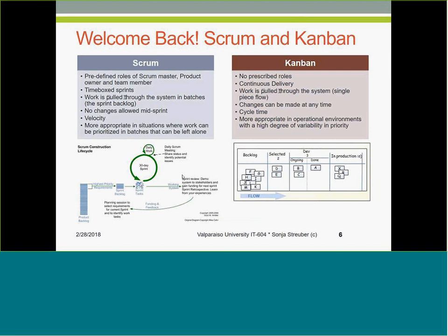As mentioned earlier, we have an option to follow a number of models. 2 of them are Scrum and Kanban. Scrum moves the work through by allocating the items from a product backlog, that's what the product owner does, right, to a sprint backlog. With a sprint backlog, then the team distributes how they're going to work those user stories or those tasks, depending on what the user stories are being broken down to, how they're going to work that off in a sprint that's typically anywhere between 2 and 4 weeks or up to 30 days.